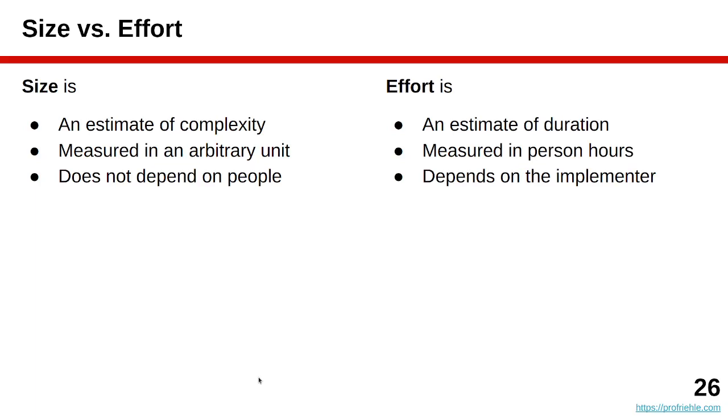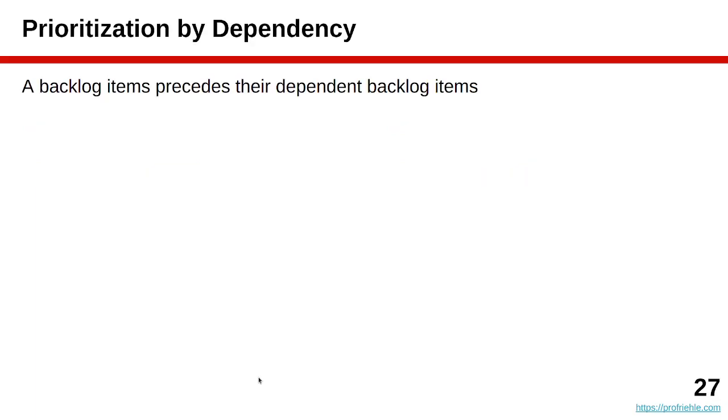So again, you are asked to estimate the size or complexity, which does not depend on people, and not the effort, which would be a measure of duration, and that would be dependent on people. You're trying to be people independent.